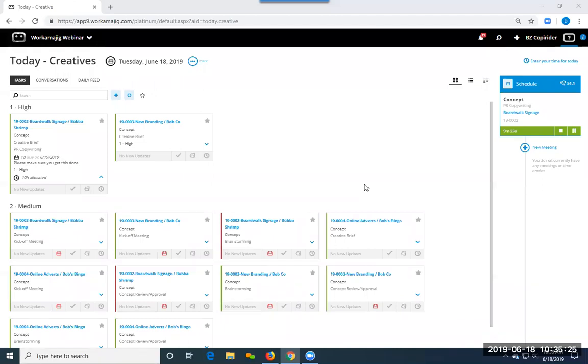Oh, I see what you're doing. Now the question came in: if I'm changing the allocated hours in the staff schedule, it says that I won't do that. It depends on how you're doing that. If you're going into the week view, for example, and saying, show me the buckets, and you adjust the buckets in that way, then you're correct. We think that you want to control it and we won't do it. But when I click into the task itself and add more hours at the task level, then it sees it as just an adjustment in the allocations for that particular task.